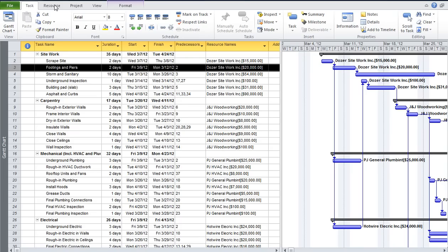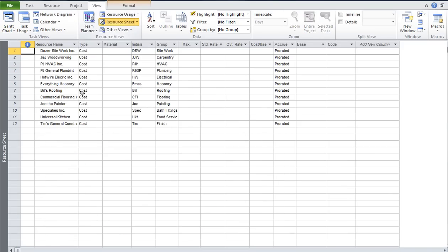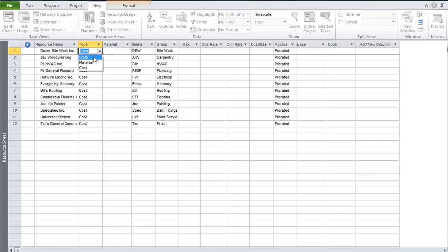Over here on the resource sheet — go to View, Resource Sheet — and we can see each of those resources were already set up. The type needs to be set to Cost. It's important that you set the type to Cost; the default is normally Work.